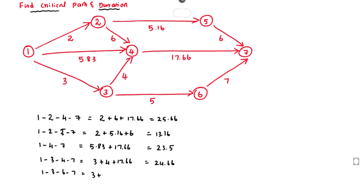The path containing the maximum duration is called the critical duration, and that path is called the critical path. The maximum duration is 25.66. The path containing this maximum duration is 1→2→4→7.